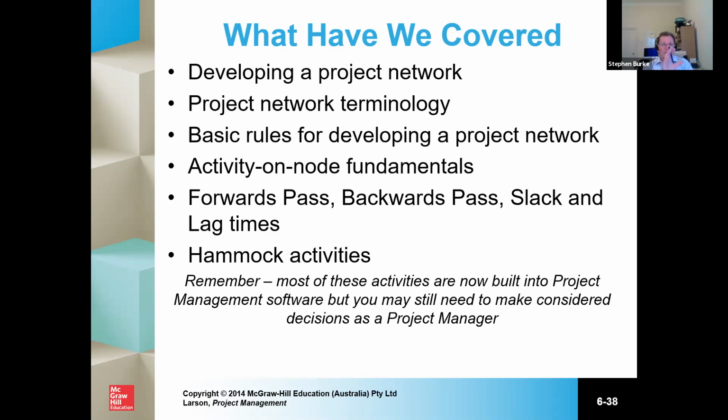So you might say, well, if only we can get 60% of what we need delivered 20% earlier, that frees up a considerable amount of lag time, which means we can start our project earlier. We have an early start. Or the latest we can start is here, and that is contingent on reducing the lags and the slacks in the project. So if we are delayed by rain or weather or lack of skilled people, then the latest we can start might be 5 days after our plan. But that means every other step in the project, every activity, either has to be reduced or run in parallel. And then we have the hammock activities, which are activities that go between them, which you put a lot of other activities in that just keep them in one place, and you watch as they go.